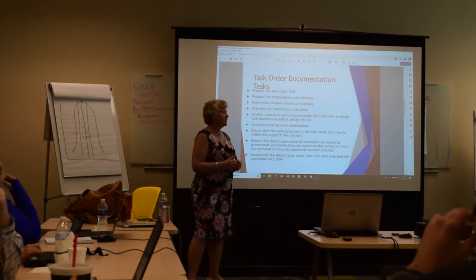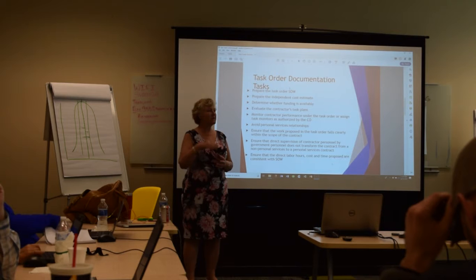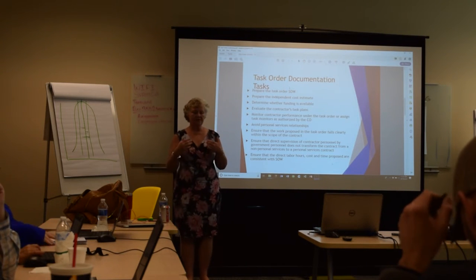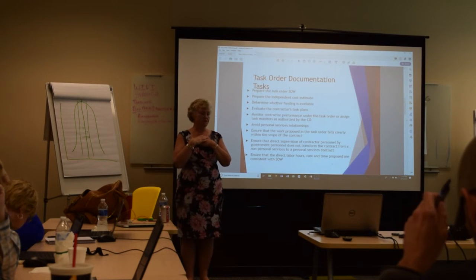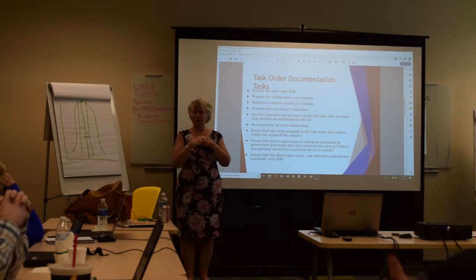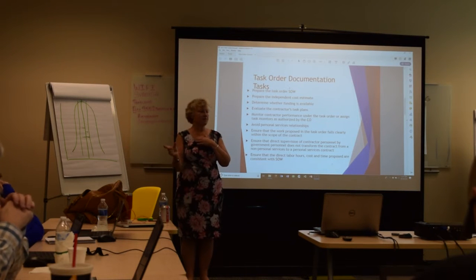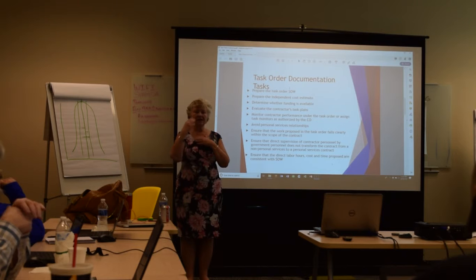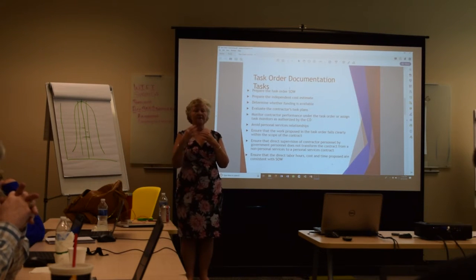They want to make sure they avoid personal services contracting. What that means is, let's say I'm the government monitor, or I'm one of the government officials, and you're doing your work. And I say, Don, I don't like the way you're doing that. I think you should be doing it this way. That goes into personal services. I am personally acting like Don's manager and telling him how to do the work better. As a government official, I can't do personal services.